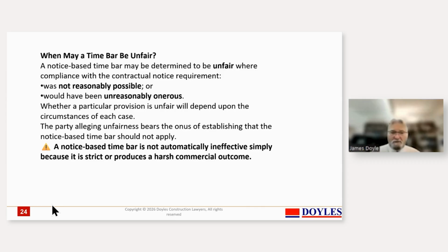You have to be careful of these days the Unfair Contracts Act that the Commonwealth has introduced. It's a very valuable act for contractors because, provided you comply with the usual requirements, it says that if there's an unfair provision, it'll be knocked out if the court agrees with you, but also that those seeking to enforce it attract substantial penalty. So it's a two-edged sword. And again, in your subcontracts, you want them to be firm but fair. That is, you've got to have some discipline in the ranks. You've got to specify what you need, but you've also got to make it reasonably fair.